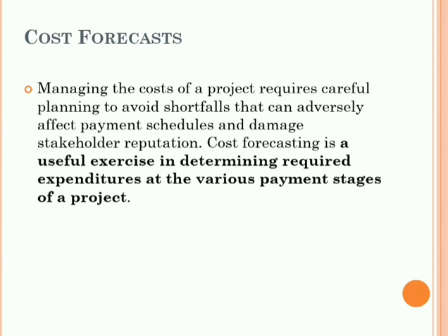There can be probable events or circumstances which, if they occur, can enhance the project performance. These are sometimes called opportunities or positive risks. Opportunities should not be used to offset risks while calculating the required contingencies. A list of opportunities should be maintained as a list of actions that the project team needs to take to improve project performance, and savings should be realized only after such actions are implemented. This is how risk management is done, including the different opportunities, in the cost forecast.